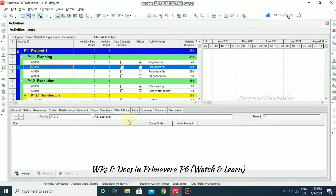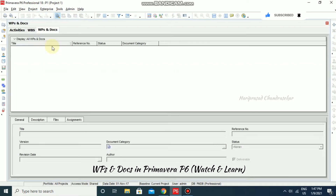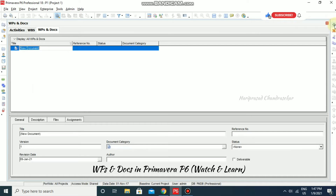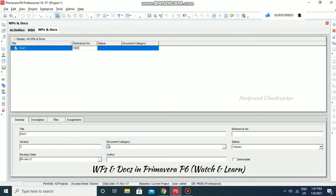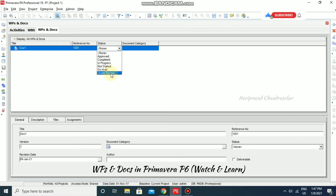We will now see how to create work products and documents in Primavera. Go to Project, then WBS and Docs. Click the Add button, then name the document — for example, 'Document One' — and enter a reference number such as 1001.